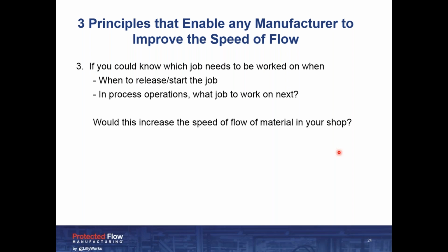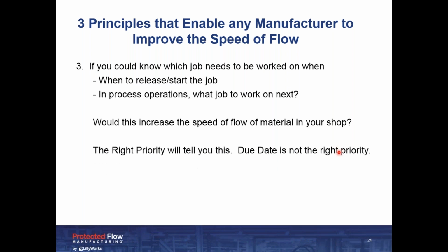What truly is the priority? Well, pretty much every system out there, every scheduling tool, is going to tell you due date. You just look at the due date, and that's the way you should prioritize. Well, is it really? If you're in a high mix environment, and most manufacturing companies are today, that means you're going to have jobs that are due 8 weeks from now that, because they have more operations or longer operations, or maybe they have to go outside and back 2 times, are more in danger of being late if you don't get started on them today than a job that's due just a week from now, right?